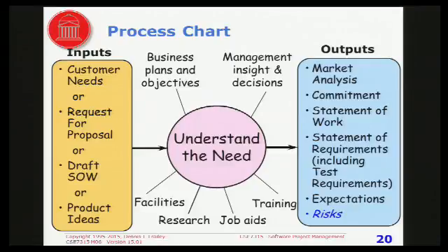Because let's suppose the statement of work said, you have to write the code in C++. And none of your employees knew how to write code in C++, but they all knew how to use C#. Well, you might say to the customer, if you let us use C#, we can do it cheaper because we don't have to train people in C++. And so that's where a draft statement of work comes in.